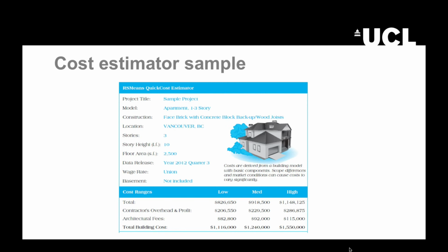For many construction projects, particularly in standard residential and commercial building, we can employ estimates based on relatively stable historical data that makes it much easier to determine cost with good accuracy. So there are different cost databases and internet sites that include building cost calculators that can predict very well some